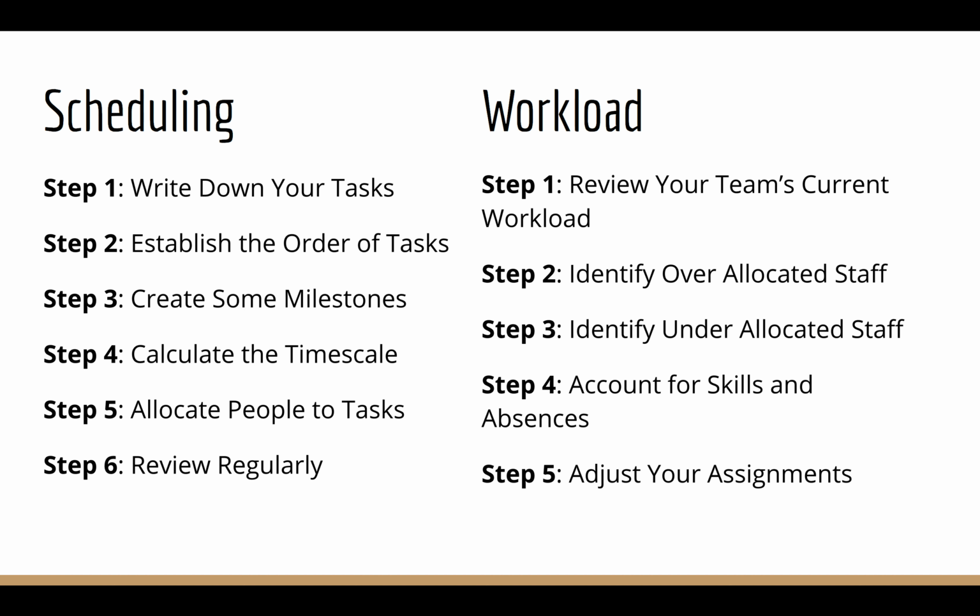Balancing schedule and workload is an ongoing struggle as a project manager. On the workload side, you need to be able to review your team's current workload, identify over-allocated staff, identify under-allocated staff, account for skills and absences, and adjust the assignments as needed to ensure that the project is successful.